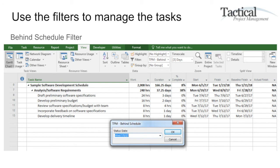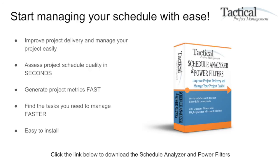You can use the filters to actually manage the tasks. Here's an example of the behind-schedule filter. If you select the behind-schedule filter, you'll instantly identify all the tasks that are behind schedule based on their baseline finish date. Start managing your schedule with ease, improve project delivery, and manage your project easily.